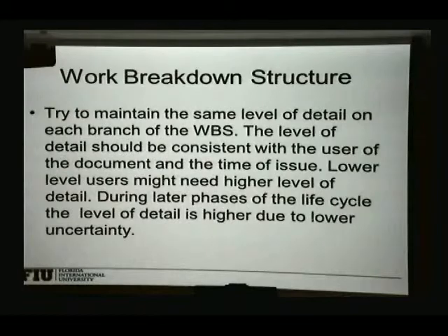I understand how it works, but if I was doing a takeoff for this building and following that logic, and I was going to take off the price of all the doors, I would have my door slab, my closer, my latch set, any other hardware, and if I have 500 doors in this building, I could multiply that times 500. But the reality is, if I'm buying 500 closers, I'm going to get one price for the closer, versus if I'm buying one closer from a vendor.